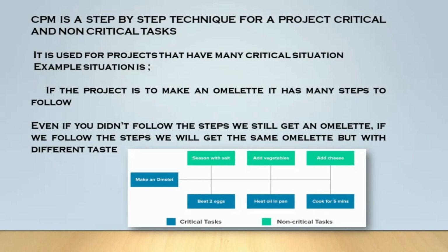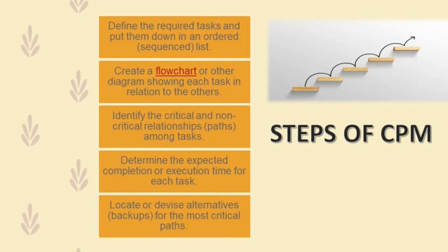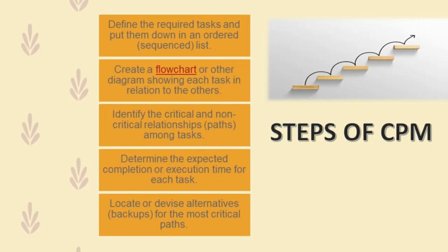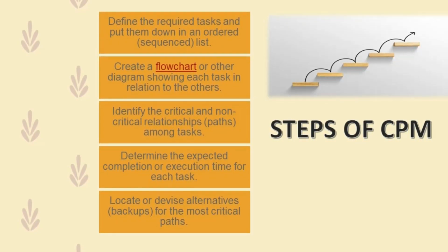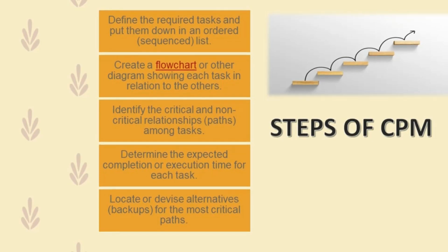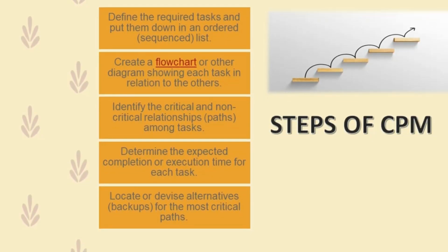The basic steps of the critical path technique are: first, list down all the tasks needed to complete the project. Note the duration of each of those tasks. If there are any task dependencies, you want to collect them too. What are the milestones in this project?